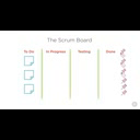So, for example, if Josh picks up an item, then he'll move it to the In Progress column and use his push pin to hold it to the board. This will tell the rest of the team that Josh is currently working with this item. Once he's finished writing the code for that item, he'll move it to the Testing column. Peter, you can then pick up that item by placing your push pin on it, signaling to the rest of the team that you are now working on testing the item.